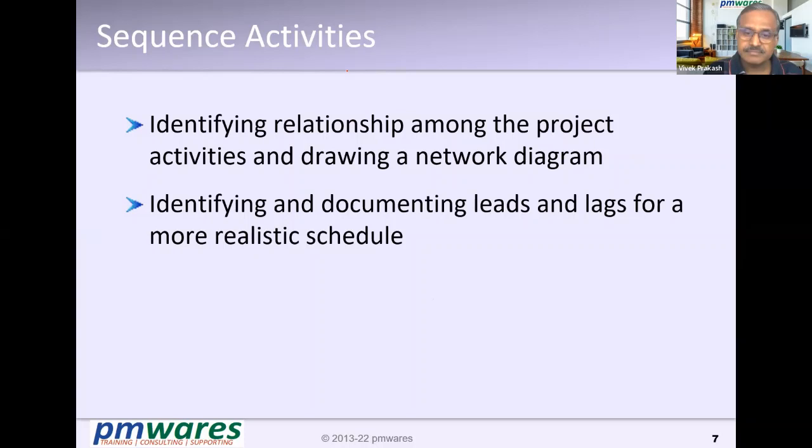right? So if you want to cast the roof, you should have four pillars. If the pillars are not there, you will not be able to cast the floor or the roof. So this kind of dependency of one activity on another is there. Therefore, it is important that we sequence them correctly.